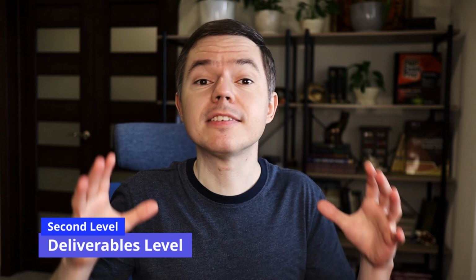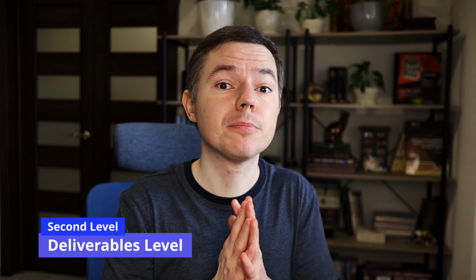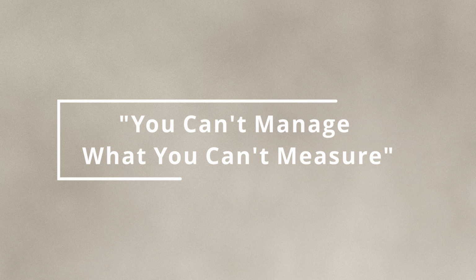So the next level is the deliverables level, and you heard me saying this a lot on this channel. A project manager should always work towards creating tangible pieces of the project. So why is it important? Well, because you have tasks assigned to this deliverable, you have estimates of time and cost, you have risks assigned to this deliverable, you have resources, you communicated on this deliverable, and so on. So you have numbers, you have something to measure against. So as the saying goes, you can't manage what you can't measure.